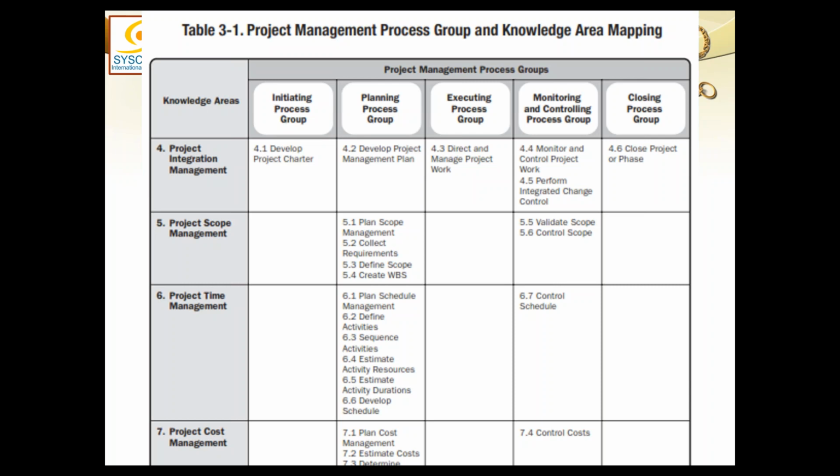Now, everything else which was created during the planning, no matter whether it was scope, time, cost, procurement or communication, which is not included in the management plans and not included in any of these 3 baselines, will go to project documents. Everything else goes to project documents. Now, if that point is understood, then let me talk a little about the controls.